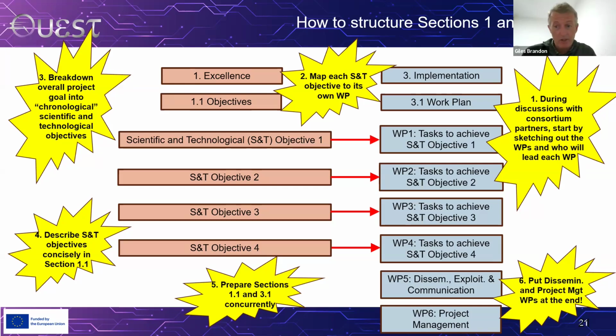And through the discussions, you can start grouping those tasks together. In other words, you're starting to form what are going to be the work packages. And obviously, the partner that's saying, oh, I can do such and such, which is the bulk of the tasks in this work package, is the obvious person to lead that work package. So it's great having those discussions. It's great identifying your work packages and ideally arranging them in some kind of chronological order.